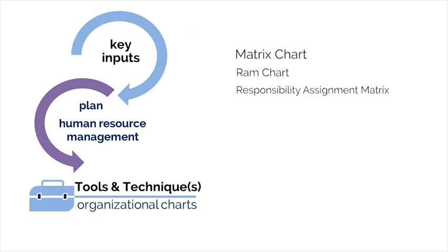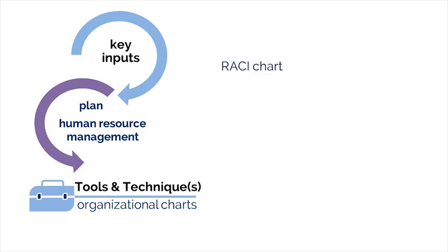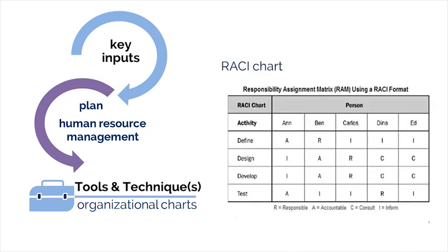When working on projects, it is rare that everyone on the team has a clear understanding of who is responsible for what. One widely used type of this RAM chart is called a RACI chart, which you can see here. RACI charts are a simple way to clarify roles and responsibilities, and it really helps ensure that nothing falls through the cracks. RACI charts also eliminate duplicative efforts and confusion by assigning clear ownership for each task. The RACI is a powerful tool utilized to define roles and responsibilities. In general, you match up roles and responsibilities with processes.